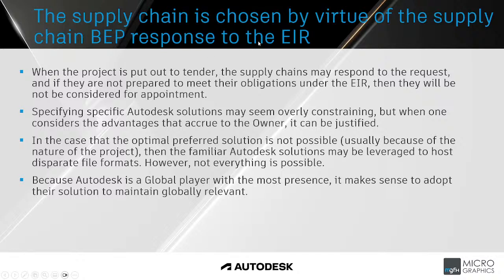Then the supply chain is hosted by virtue of the supply chain BEP response to the EIR. Right? So when the project is put out to tender, the supply chains may respond to the request, and if they are not prepared to meet their obligations under the EIR, then they will or might not be considered for appointment.